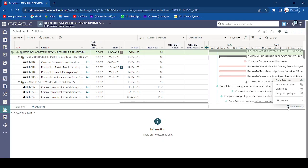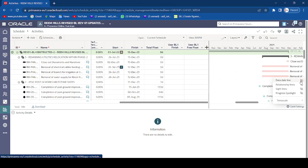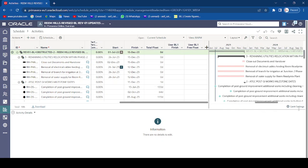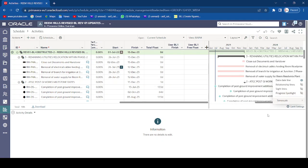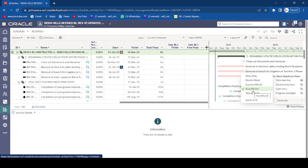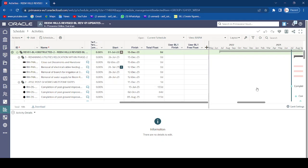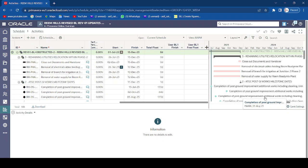For Gantt chart settings, click the Gantt chart settings option. Here you can toggle the Data Date line — uncheck to hide it, check to show it. You can also show or hide Relationship Lines, Focus Spotlight, and other options. Under Timeline settings, you can choose the timescale — for example, Year/Quarter, Quarter/Month, or Year/Month. I prefer Year/Month as the timeline setting.